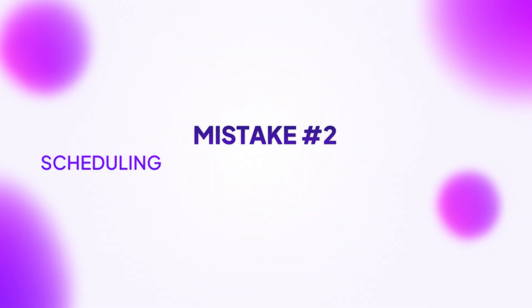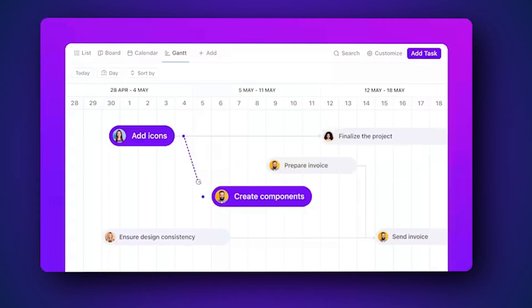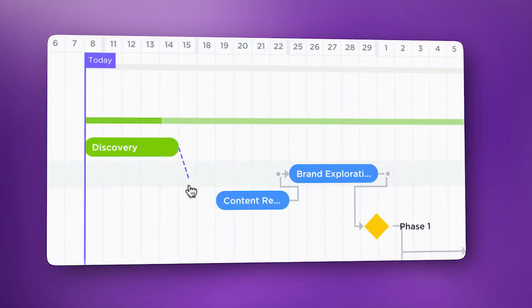Mistake number two is scheduling tasks like they exist in isolation. You can't launch the website before you build it; you can't test the product before it exists. Yet somehow, ambitious project calendars pretend these connections don't matter. The fix is building a simple Gantt chart. Did you know the Gantt chart was invented in 1910 by Henry Gantt? We're still using it because it works that well.